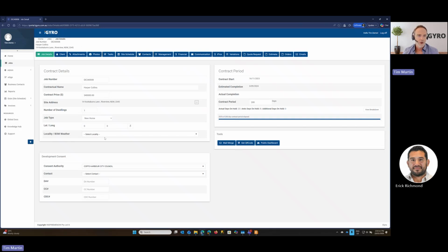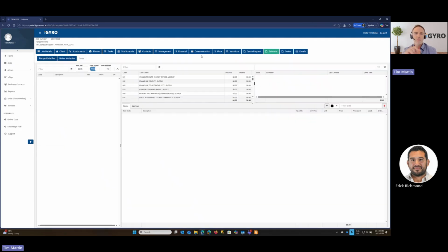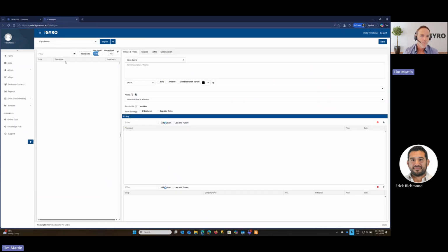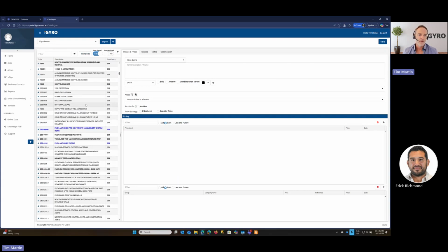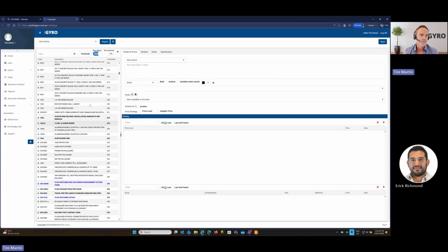Okay, so once you've done a little bit of homework there and got that set up, we'll find the Estimator tab. So click onto that one, and this is where you build up your bill of quantities. Now, we've jumped straight in. You would have already set up your catalog in here in admin. So that's covered under a different webinar series that we did. So you would need, if I just right click that, I'll have a quick look at the catalog. So your catalog is a full list of all of your items that you'll be adding to bill of quantities.